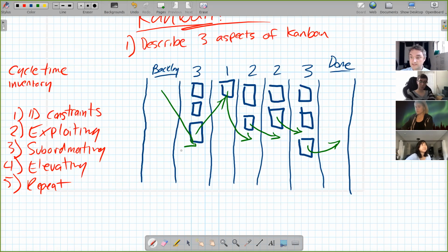That's Kanban. The way this works in most processes is the opposite. As soon as this team is done, they take on more work, regardless of whether or not there's capacity in the next step. It's a push process. It's how fast can we get this step done?